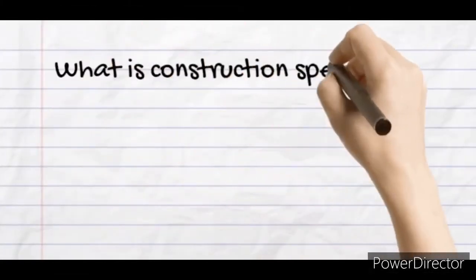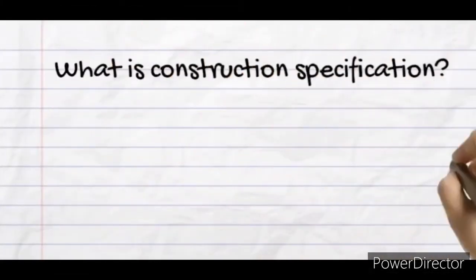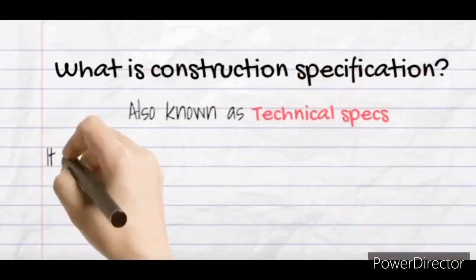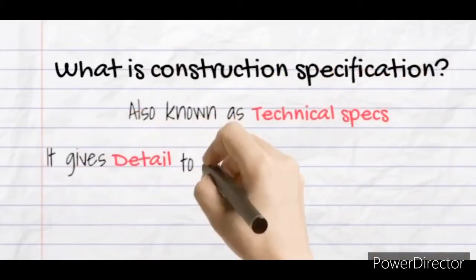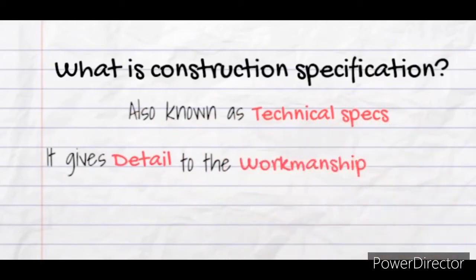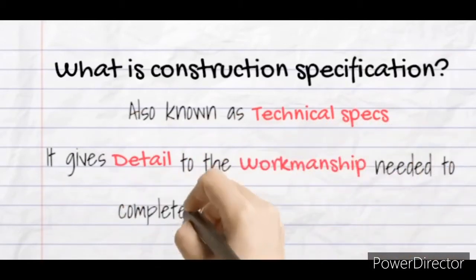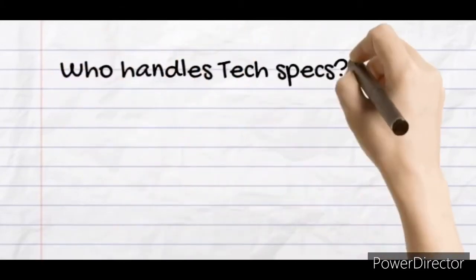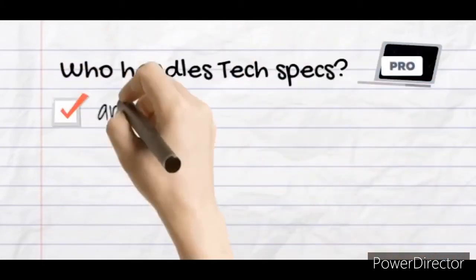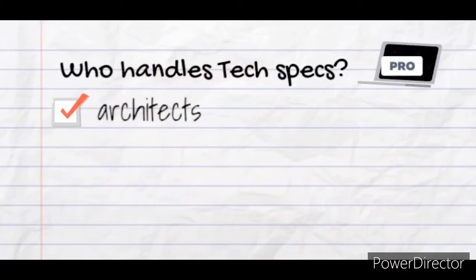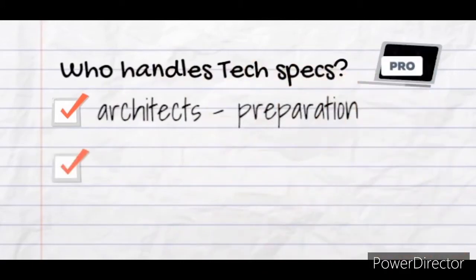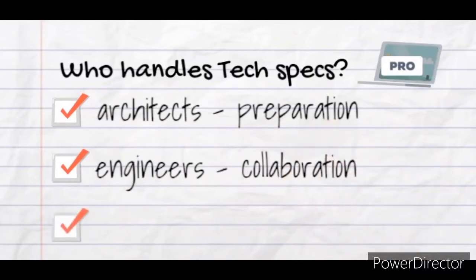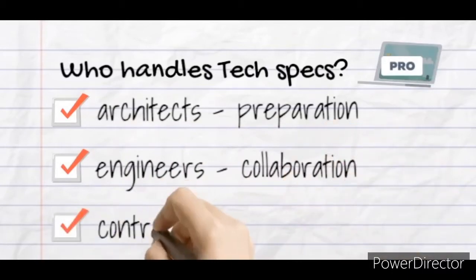What is construction specification? It is also known as technical specification — it gives detail to the work and workmanship needed to complete a construction project. Who handles technical specifications? Usually specs are prepared by the architects in collaboration with the project engineers, due to their breadth of technical knowledge. It will then be handed to the contractors to reflect and translate the specifications to the subcontractors.